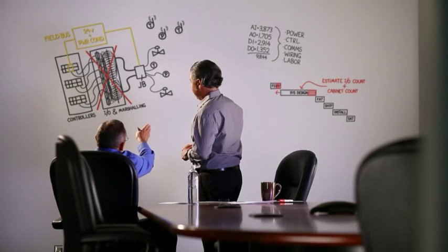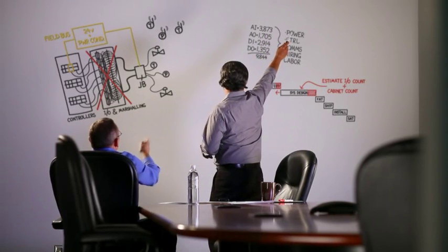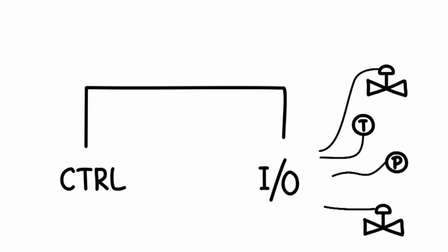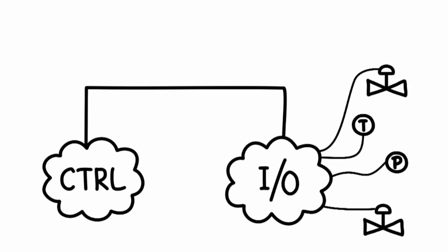We need to design to like 90% accuracy early, then finalize the requirements when we're closer to install and startup. I'm not sure I follow. Well, like I said before, I.O. count drives everything, including cabinet count. What if an I.O. card could report to any controller? Kind of like a cloud of I.O. connecting to a cloud of controllers. Yeah, well, now I'm cloudy.